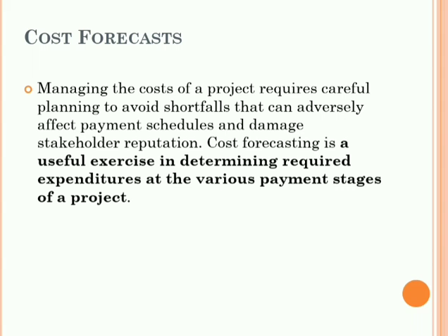We can see that the cost forecasting process is in two steps, that is confirming the forecast basis and the detailed analysis and forecasting. In confirming the forecast basis, the basic principle of cost forecast is that all foreseen cost should be forecasted, all the risks should be adequately covered with contingency, and savings against opportunities shall be realized only after the saving generating actions are implemented.